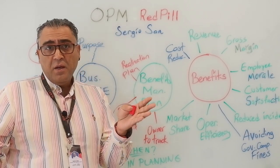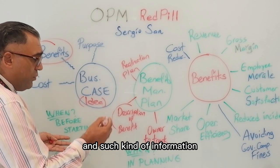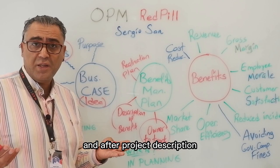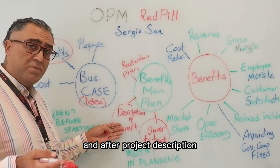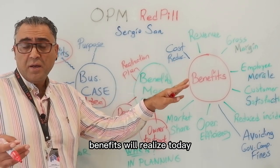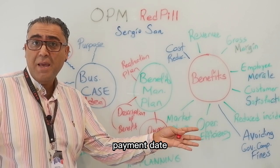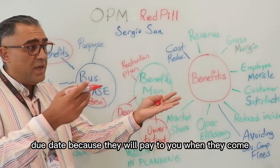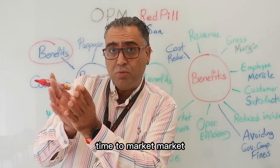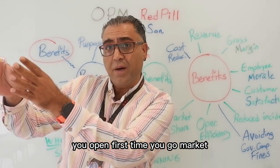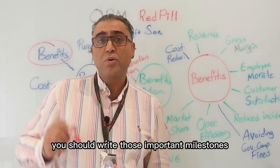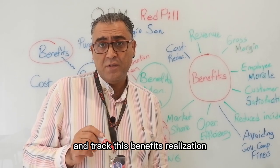The benefit management plan also includes a benefits map, benefit realization plan, benefit tracking plan, and information on who will track benefits throughout and after the project. Description, detailed description, milestones, important dates, when benefits are realized — maybe your customer payment date or product launch date, time to market. You should write those important milestones and track benefit realization.